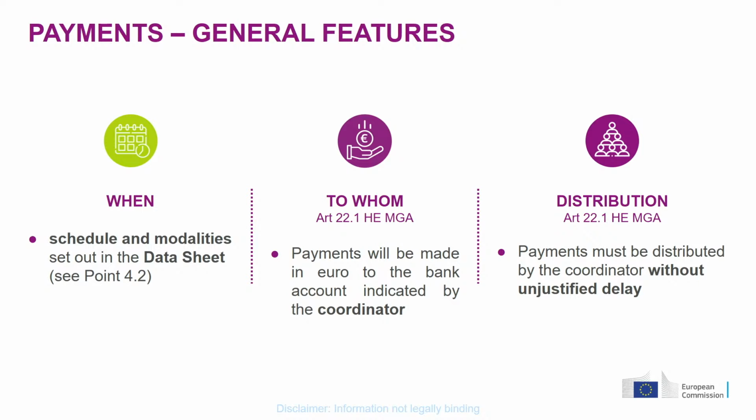Now, for the payment, what you will also have to know, and probably this is something you already know as coordinator, is that payment will be handled through you, the coordinator. You are our entry point, so to say, our main contact point. And payment that will be released by us as granting authority after the periodic report stage will be paid to the coordinator. This is also reflected in Article 22(1) of your grant agreement. So this payment will be made in euro and to the bank account of the coordinator, and the bank account of the coordinator is also mentioned in the data sheet, as my colleague Isabel was mentioning before in her presentation.